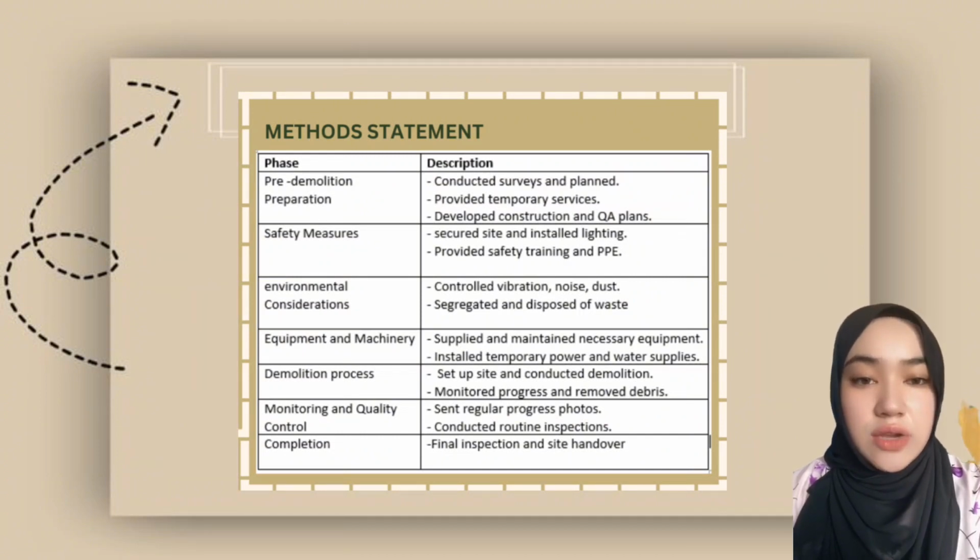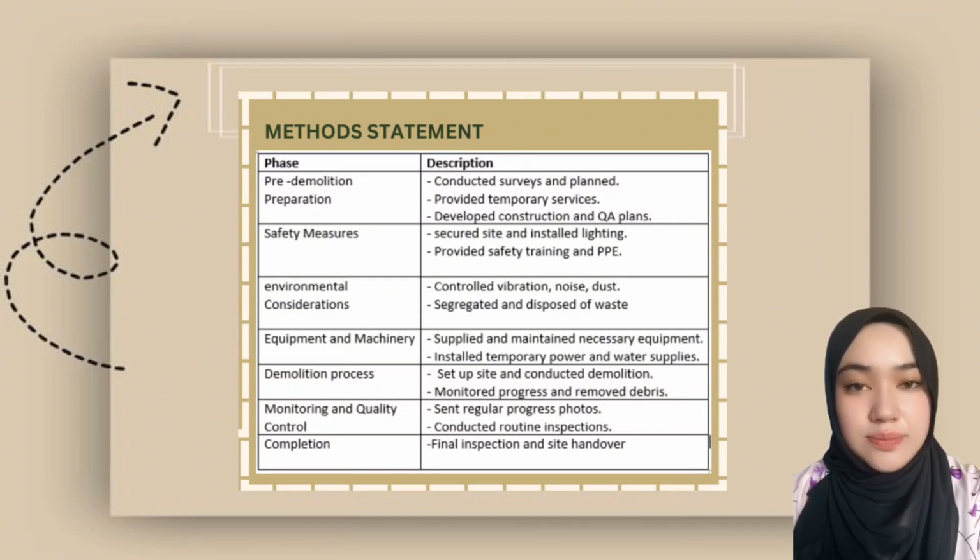For the monitoring and quality control, progress was documented regularly with photos and inspections to maintain quality standards and ensure compliance with project requirements. Upon completion of the demolition, a final inspection was conducted to verify adherence to specifications. Temporary structures and debris were cleared, leaving the site clean and ready to hand over to the client.